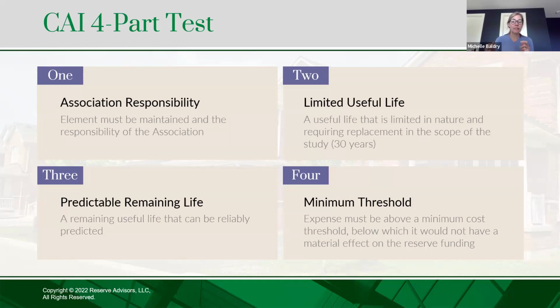But luckily, the practice is starting to change now, where developers sometimes are doing reserve studies and actually preparing them from plans. So all the quantities are taken right from the construction plans, and a reserve contribution is put into the budget from those plans to ideally get the budget and the dues off on the right track initially. And then once it is actually built, an engineer comes out, performs that level 1 reserve study to really put eyes on everything.